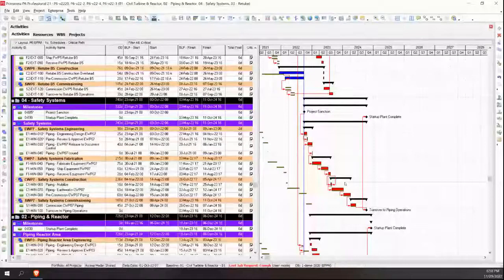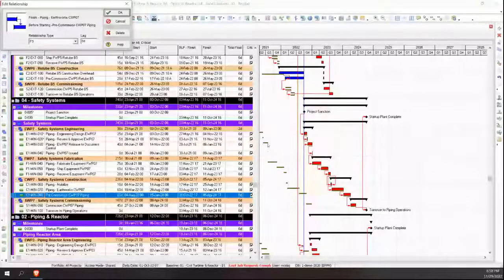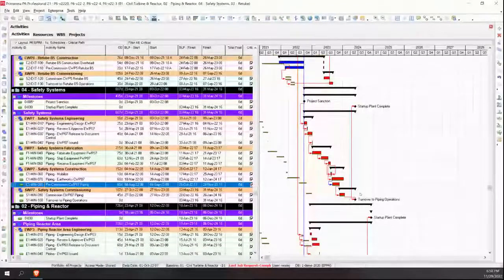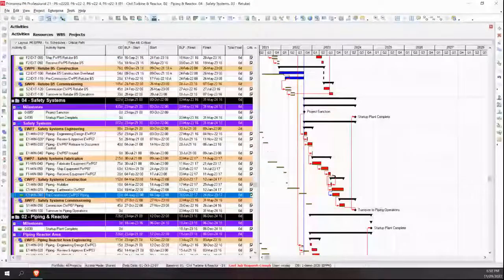Okay, so you're going to have different options. You could rearrange the order of work. So, for example, instead of having this whole piping mobilization take place before the earthworks, could I start somewhere before, right? So instead of waiting for it to finish, could I start it partway through the mobilization? Okay, and maybe I can get started 5 days after I start mobilizing. Okay, so those are the types of things you're going to have to address if you're seeing a critical path and you're seeing that certain activities are behind.